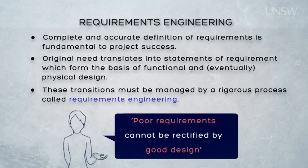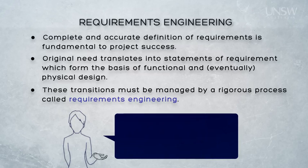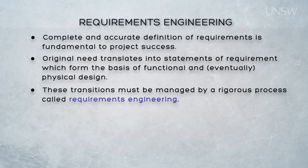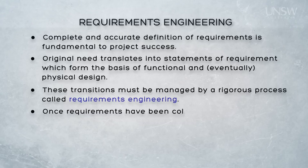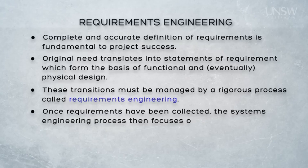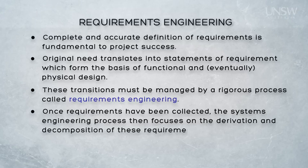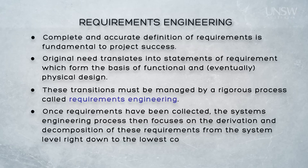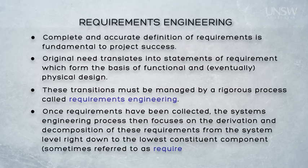Requirements engineering also focuses on the fact that we can't fix poor requirements by good design, so it invariably follows that rigorous development of requirements is absolutely essential if the acquisition is to be successful. Once the requirements have been collected, the systems engineering process then focuses on deriving and decomposing these requirements down to the next level, in a process called requirements flowdown.